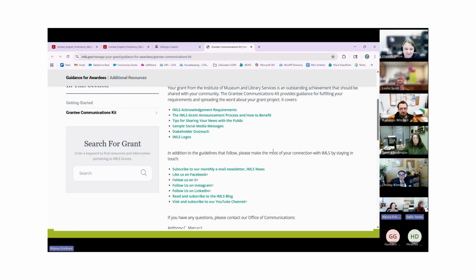I do want to say something. This question has come up. IMLS credit has to be there not just for the period of performance, but for the life of your project. As long as your project is out there and going, as long as you're using equipment, five years from now, if you're still using the equipment or technology you buy, you still need to credit IMLS.